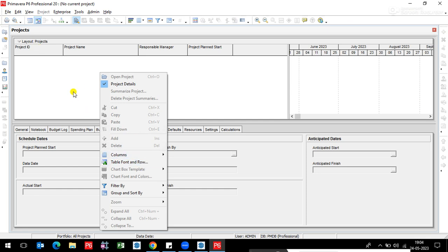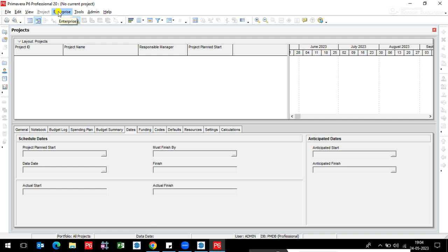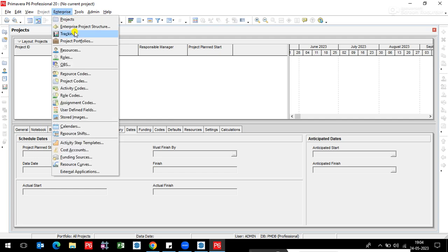The reason is, when you start a project in Primavera, before that you require the organization structure. Simply, we can say the enterprise structure, that organization project structure, is required. You can define the company location wise, or department wise, or define the organization into categories like work type wise. For example, if you go location wise, I started some ABC project, running across east, west, north, south of India.